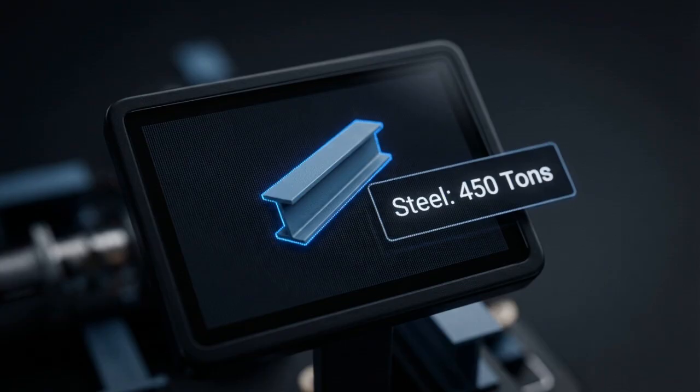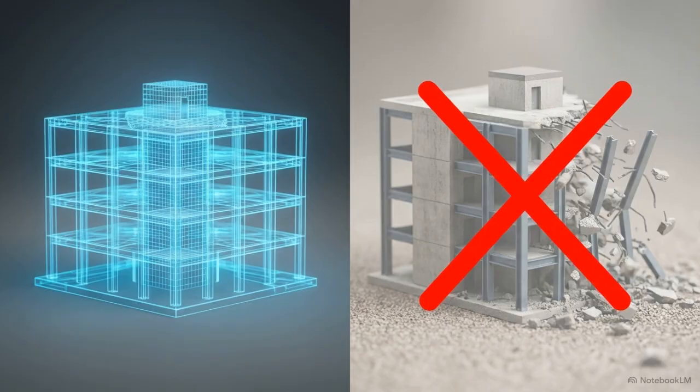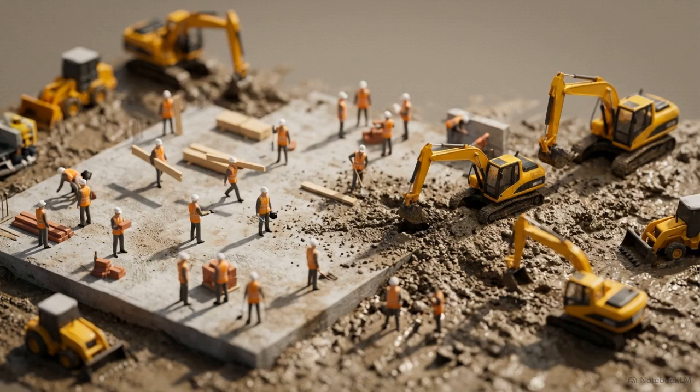This yields precise automated quantity takeoffs, exact cash flow matching, and digitally resolves physical pipe clashes. Multi-dimensional digital integration allows teams to fully construct the building in data. They absorb their most expensive mistakes in a simulation rather than on the job site. Even a perfect 5D model must survive contact with daily execution.